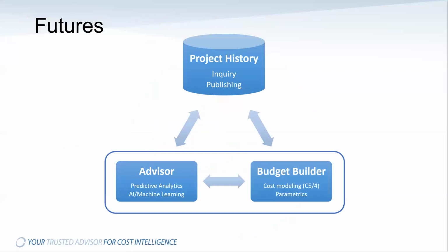Last slide I'm going to show you is a little bit of the future of the Cortex platform. So project history is the first solution out of that platform, released about 2 years ago. And we're in development now with a late 2020 target for our conceptual estimating solution, Budget Builder. And Budget Builder is designed to support several project cost modeling methodologies for early stage screening, class 5 type estimates, as well as down to probably a schematic or class 4 level, depending on your data.